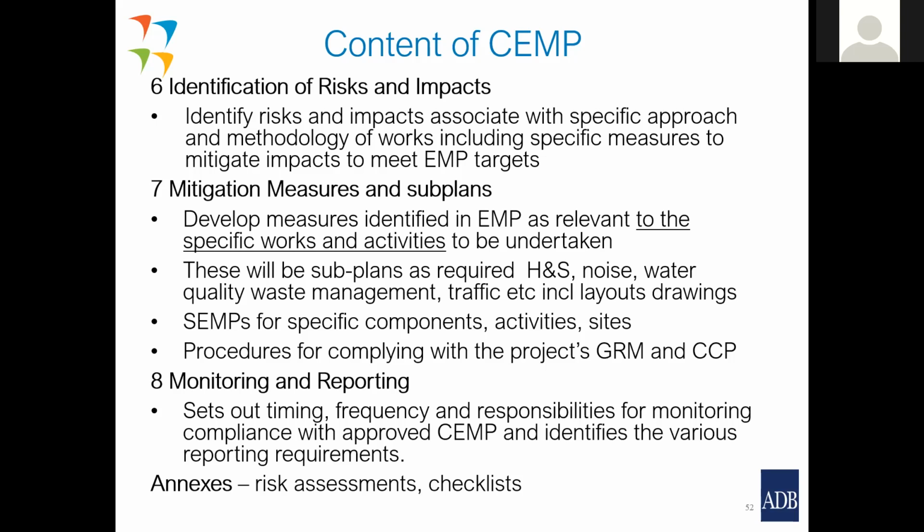The EMP is based on what we understand to be the project in terms of the detailed design, but the CEMP is the EMP implemented specifically by the contractor in accordance with his methodologies. And we want to see the details. We want to see how he's doing it so that we can monitor him against that.